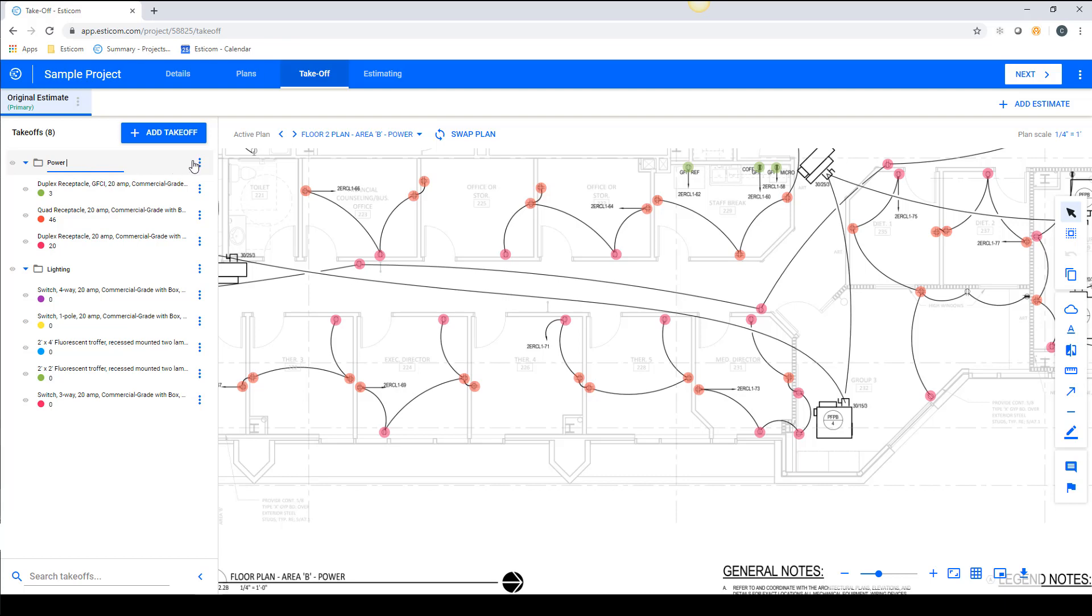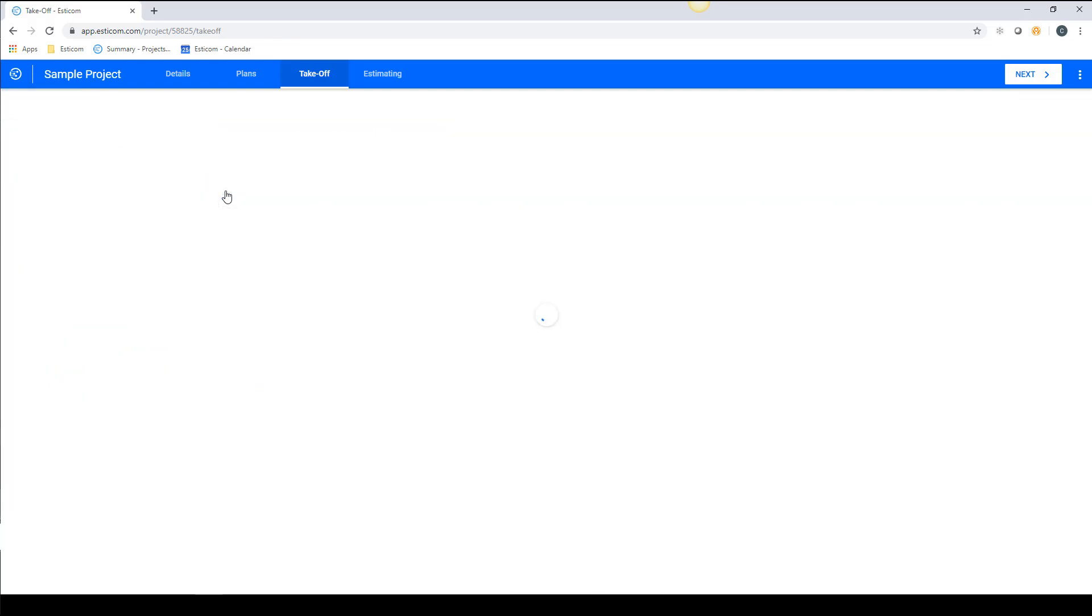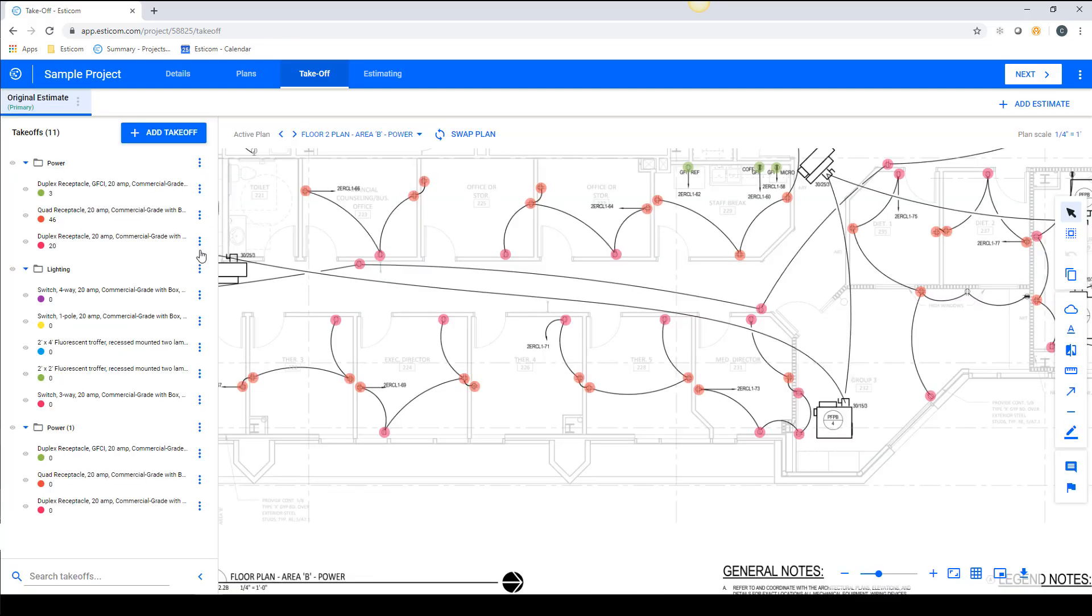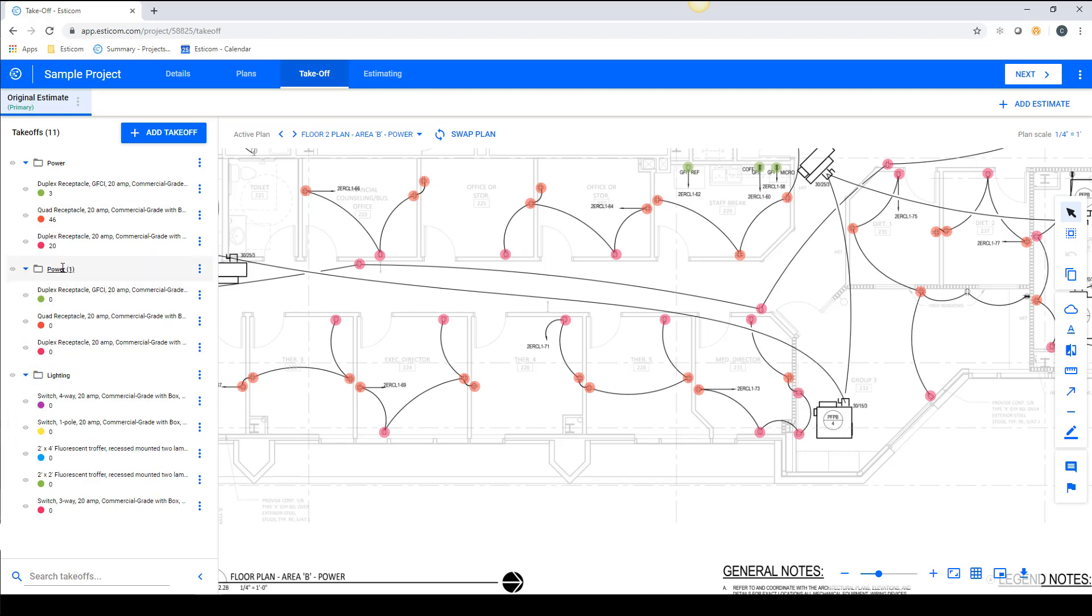Another advantage to groups is that you have the option to duplicate groups for different sections of a project. So for example, we'll create a new group called Area A Power that can be used to separate the takeoff counts and material and labor costs for that section.